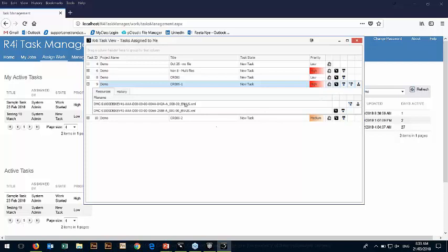You can see here that the first starter module has a little note and icons on it. It's got a reset or a check-in. Again, it gives you the ability to indicate that you can't check that out at the moment. Because I'm logged on as administrator, I'm getting these two, since you can reset it if someone has it checked out. But if I was logged on as a normal user, it would show that it's checked out, but I couldn't reset it. So until that data module has been checked in, I can't do my next task with it. It won't let you check out a data module until it's been checked in.